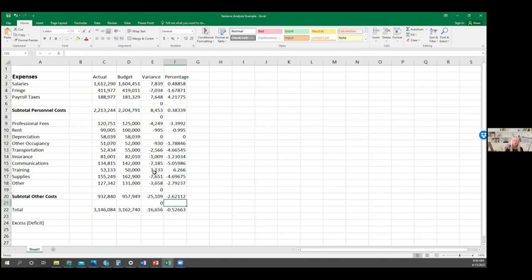Again, this is not as the total budget, right? But there's a problem area here because, again, if we just looked at this, we would think that we're doing okay, right? If we just look at our numbers between what we spent this month versus what we budgeted, this would make us think that we didn't have any issues. But we do have some issues. We have some places that we're spending more money than we should be. And if we don't control that, that may end up over the next 3 quarters or next year costing us way too much money.